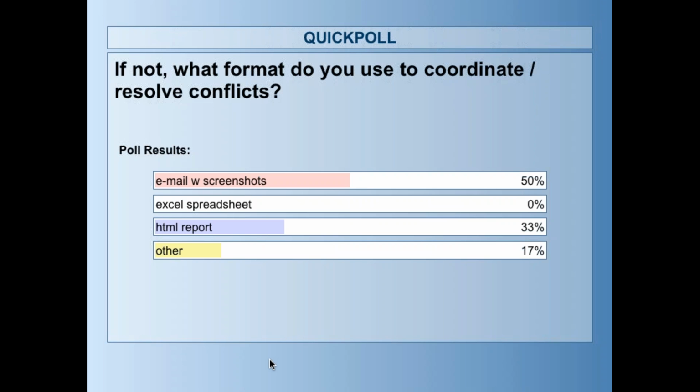It's very interesting because I was previously using HTML reports when I was doing coordination, mostly with Navisworks and Revit. It is an efficient way of exchanging reports, but it's just not as good as BCF would be, because the camera location has to be described, so you have to tell where it is in the building. If you use BCF, you won't have to describe where it is. You just click on the BCF, click on open, and it retrieves that location automatically. So it's much more efficient. It takes a lot less time for the end user, the guy working in the modeling environment, like the Revit guy. He's not going to have to read the HTML and find the location in the building. He's just going to open a BCF, click on open, and that's the view. It's there.